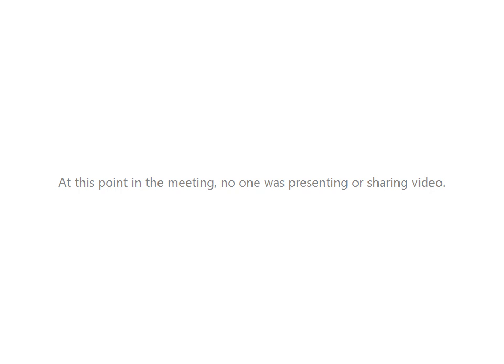So the sprint retrospective is where you go to validate whether the process that you're following right now is good or not. It would normally be a meeting where at the end, you basically add a new work item to take care of how you're improving things. Notice that I don't have a sprint retrospective item here, right? And you can record it in several ways, for instance, in the sprint configuration. We can do that in just a bit.